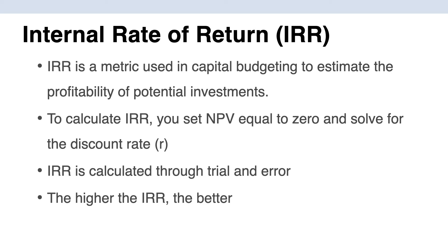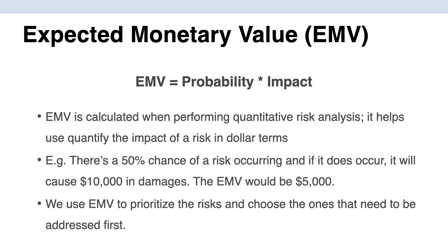Next is IRR, or Internal Rate of Return. IRR is a metric used in capital budgeting to estimate the profitability of a potential investment. To calculate IRR, we set the NPV equal to zero and solve for r, the discount rate. You can do this through trial and error, but software programs will calculate IRR for you. You want to pick the project with the higher IRR. This calculation is done at the beginning of the program when evaluating the business case to see which program makes more sense for your organization.